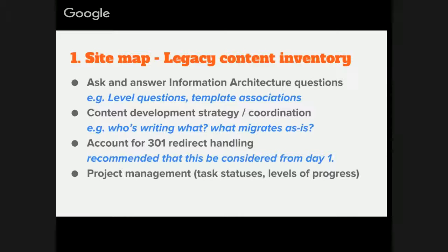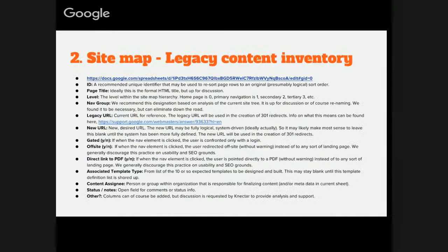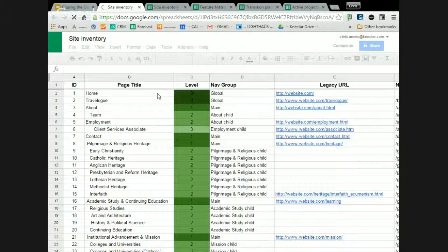And one of them is that in all of these spreadsheets, there's always an action column, which is of course the juicy one. It's the interesting one. Well, who's going to fix this, or who's going to close this gap, whatever it is. And let's filter by that person. So here's a task list for that person that just emerges from this gap analysis. It's pretty beautiful. And so this, don't read this, don't even try. I will share this with anybody who asks, or I'll post it somewhere, like on a blog on our website or something.